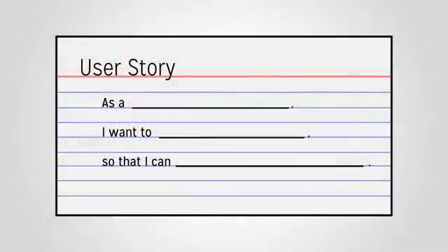After that, Bradley showed you the user story. You'll use user stories very frequently in agile development. A user story has the structure: as a blank, I want blank, so that blank. A user story is an easy way to demonstrate the who, what, and why in a neat little package. Bradley also showed you the product backlog and how to use story maps to prioritize and organize the elicited and expressed user stories.